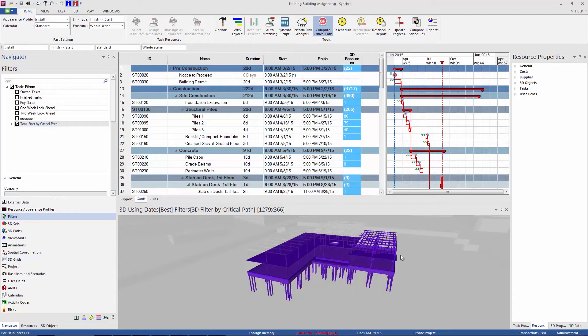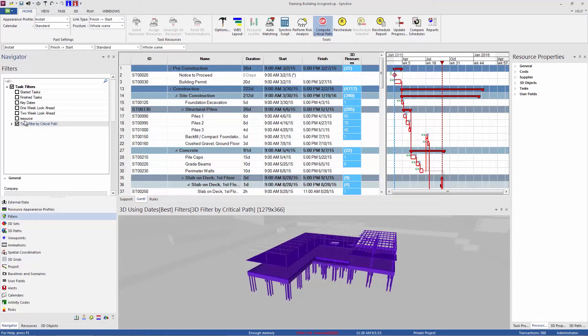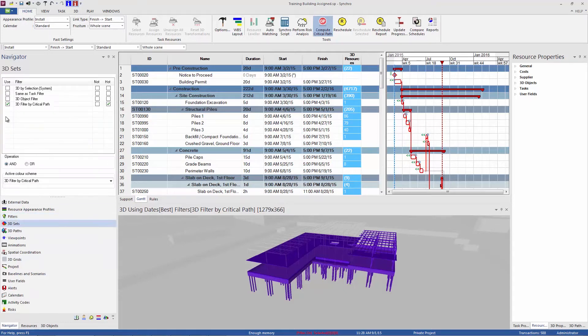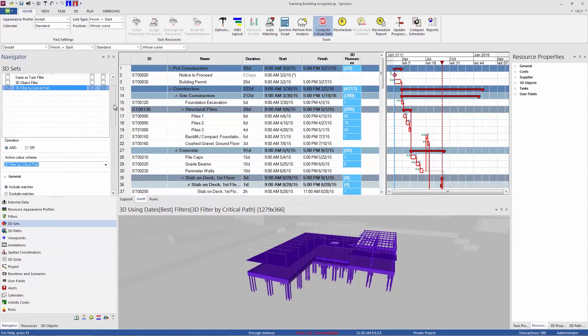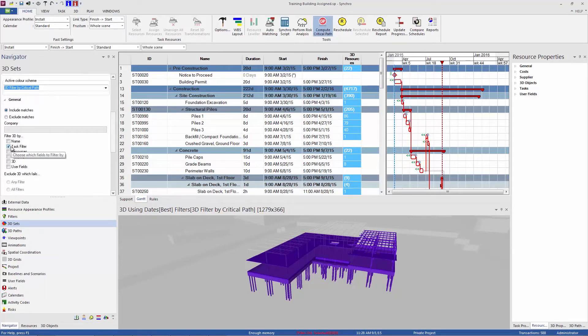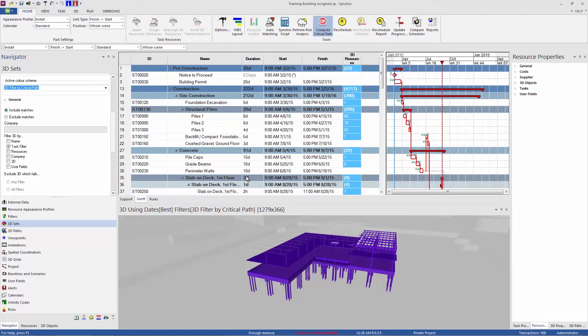And we're seeing something also going on in the 3D window. So what this critical path filter has done is it's created a task filter by the critical path, and it's also created a 3D set by critical path, and those two are linked together. So if you see this one below, all it's doing is just filtering the 3D by the task filter. So anything, any tasks that are visible here, objects that are assigned to the filtered tasks only are showing up down here.